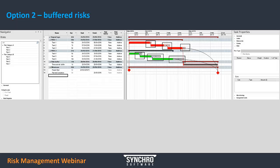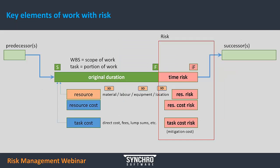Okay, great. Thank you, Pavel. We have a couple of questions. The first one is: what's the difference between risk analysis and risk assessment? Well, risk analysis is a wider project management process, and it combines different methods and tools which we need to identify and quantify all the risks, and also to propose mitigation measures. That would be the bigger process. The risk assessment would be just the first step in the risk analysis process. I think the risk assessment is simply the estimate of the outcome — we're talking about specific situations, a specific scenario or environment. Once we identify the risk, then we need to assess what is the impact and probability of the risk.